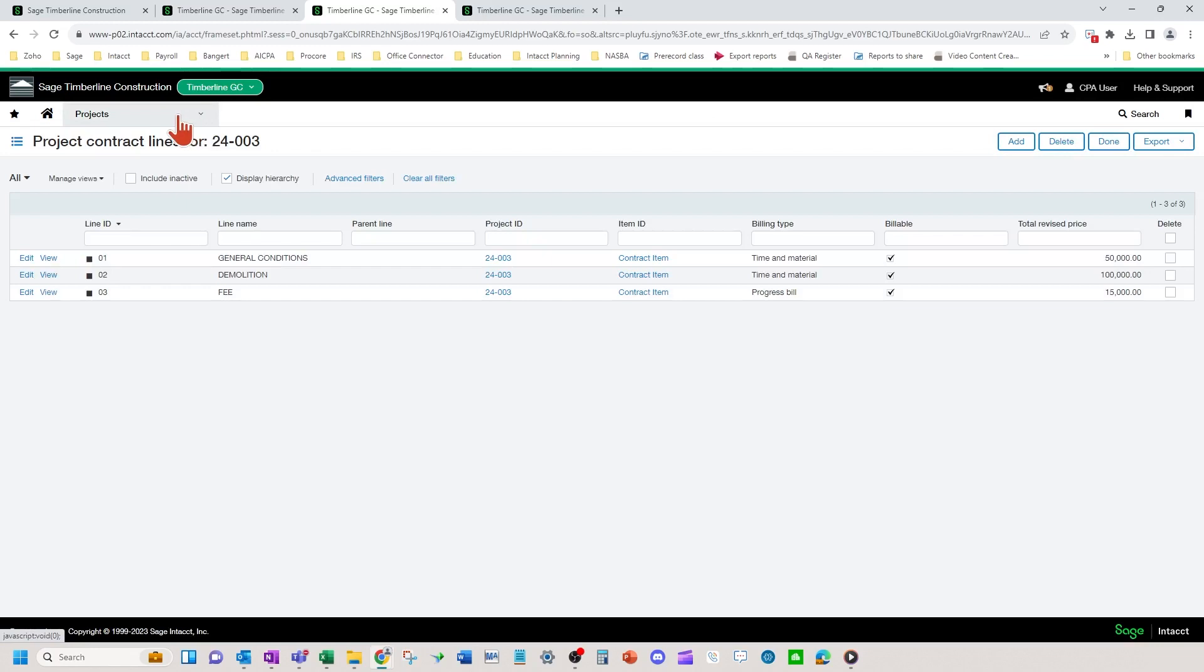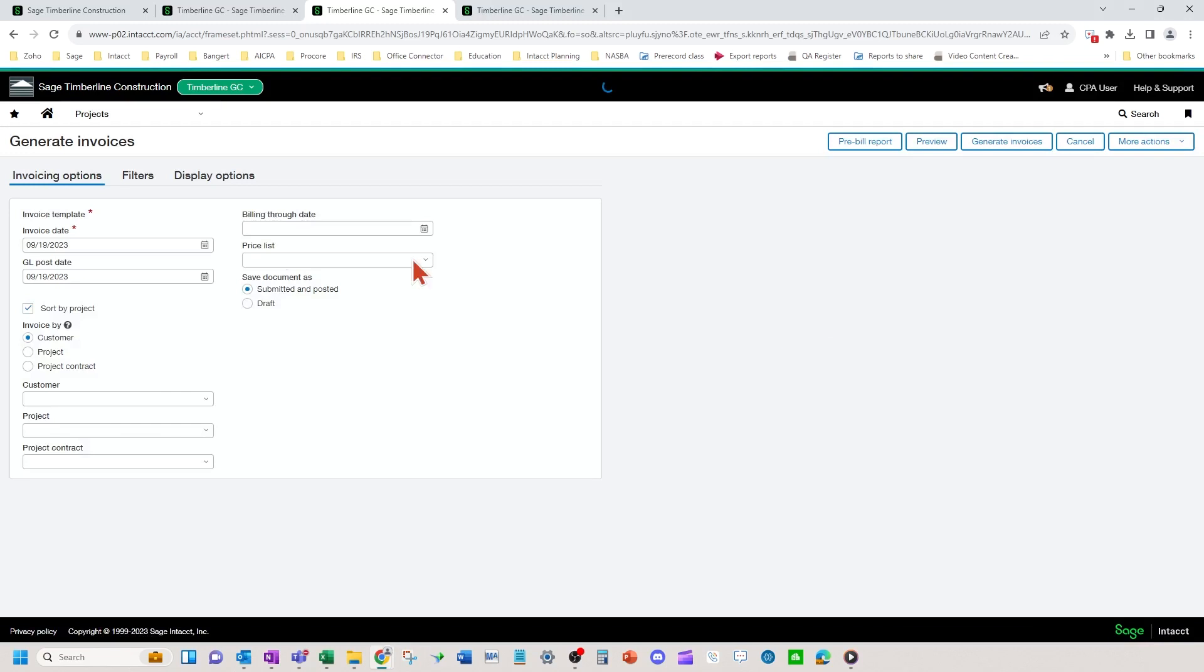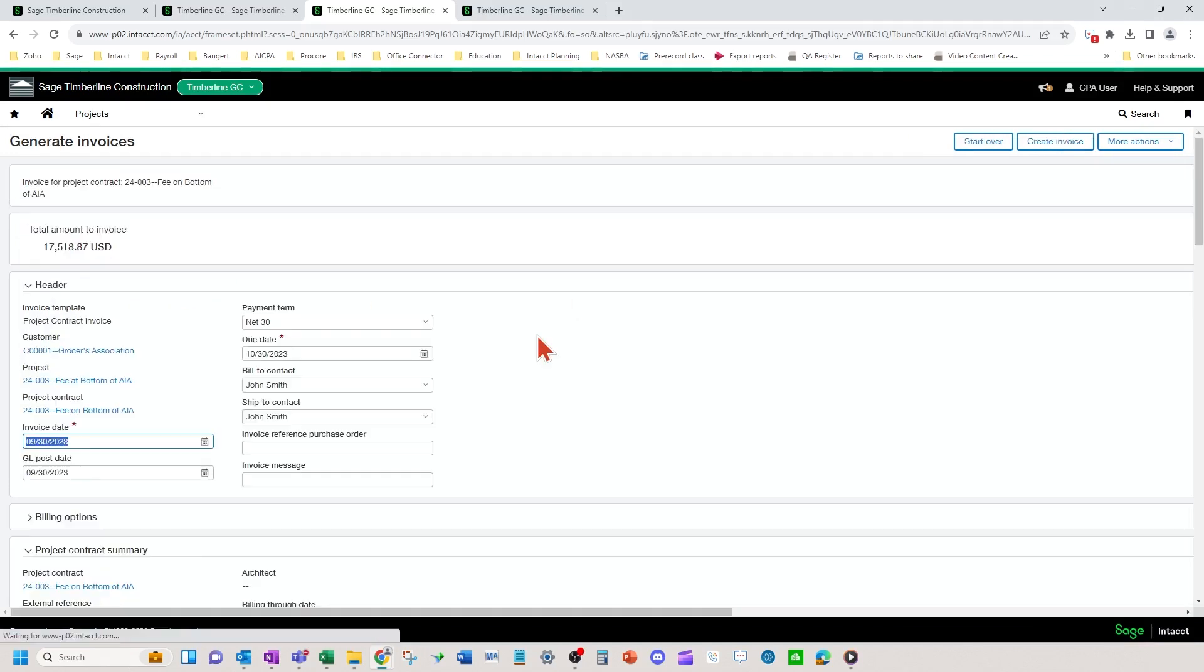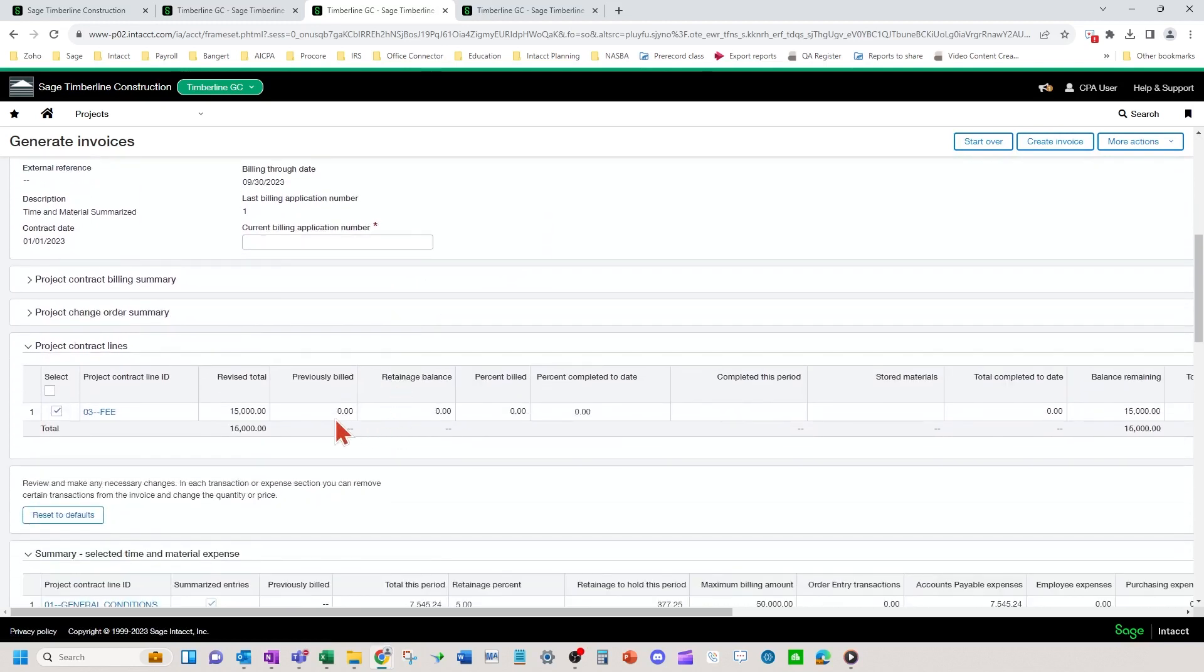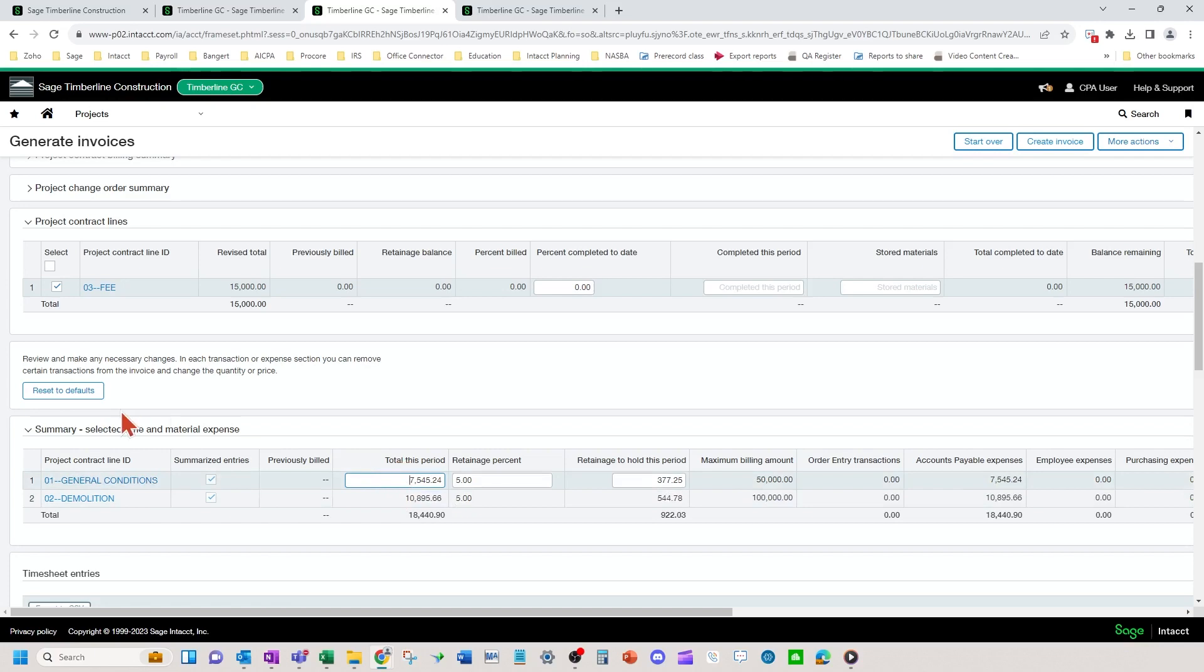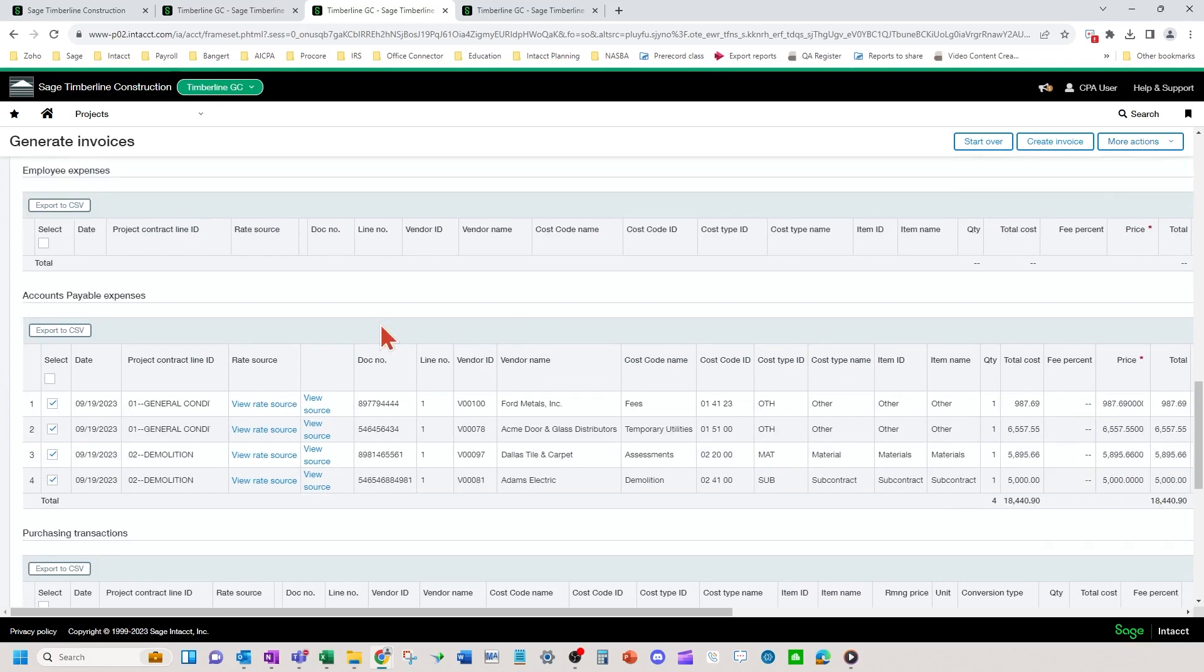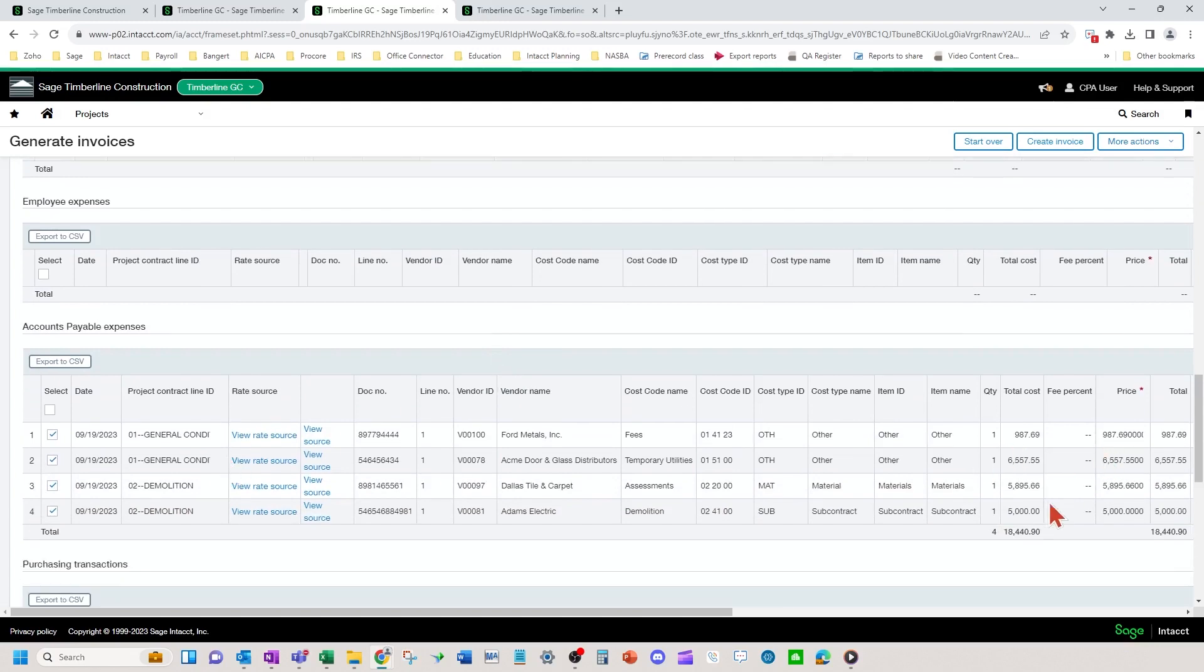So when you come in here to generate invoices, you're going to type your fee in in this section. So this is where normal progress billing lines will come into this generate invoices screen. Your costs for general conditions and demolition for summarize TNM are down here and you can see all your costs right here. No markup. You scroll up, you can make adjustments like I've shown or make them down here.